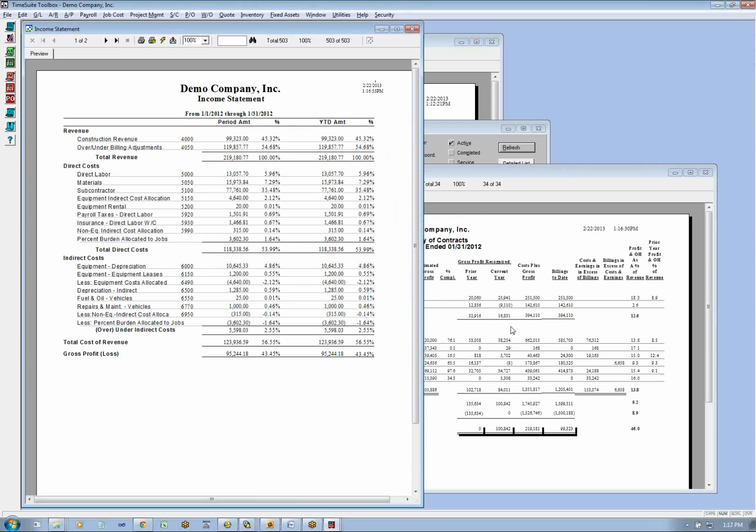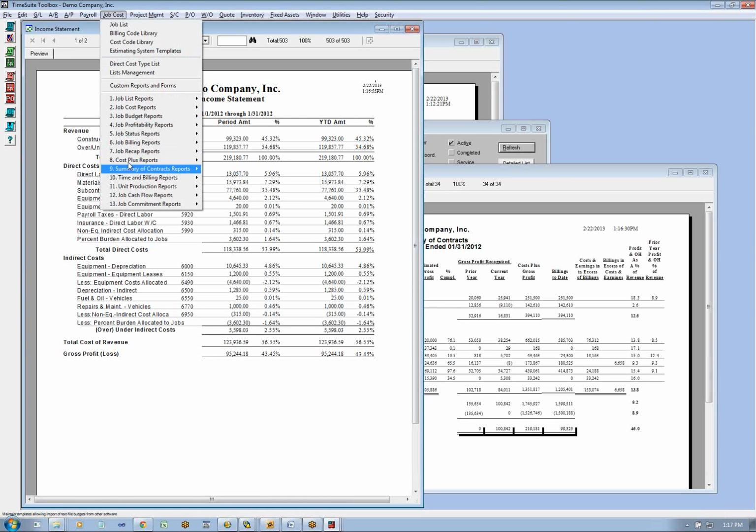I know I've looked at a couple of companies' numbers recently where their job costs don't tie out, and in both of those situations they had direct job costs posting into their direct non-job expense accounts, and those are set up for the labor burden only. When people post into it, it'll get their job cost off. In that cost control webinar, we cover that concept.